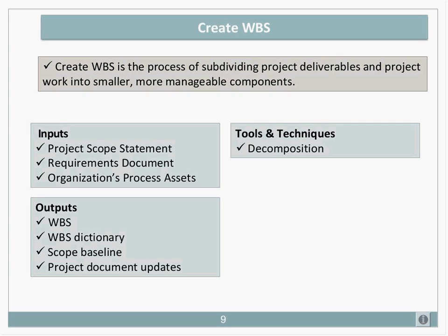The technique, we've only got decomposition there. These techniques can be used by means of related workshops, etc. From this process of the WBS, we get subdividing the project into manageable components. Remember them, work package levels. The WBS dictionary supports the WBS with a more detailed description of the WBS components or work package level.